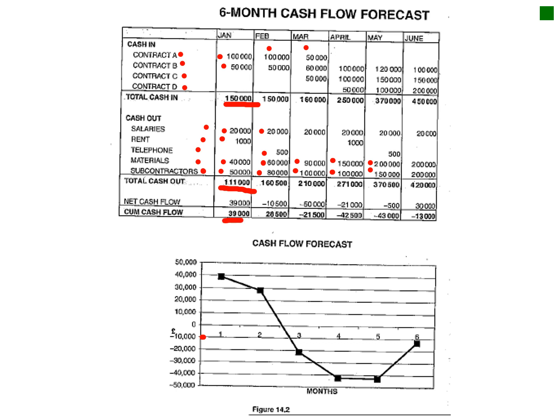So in this case, month 1, the inflow was actually more than the outflow, so we start with a 40,000 surplus. Then in our second month, your inflow is 150,000, and your outflow is now 160,000. The difference is 10,000, so it goes down by that 10,000.